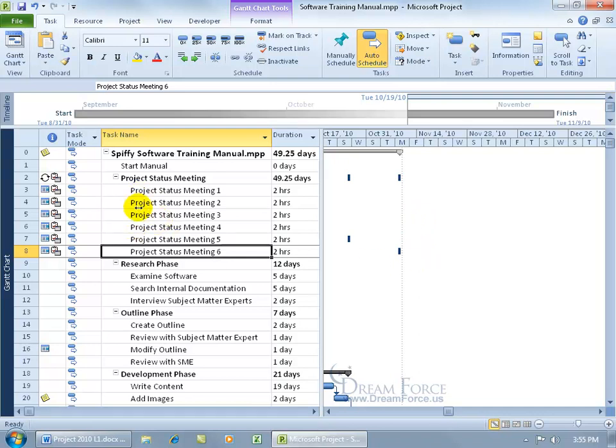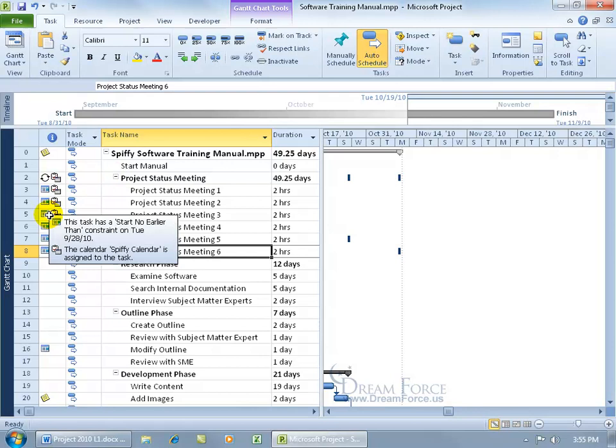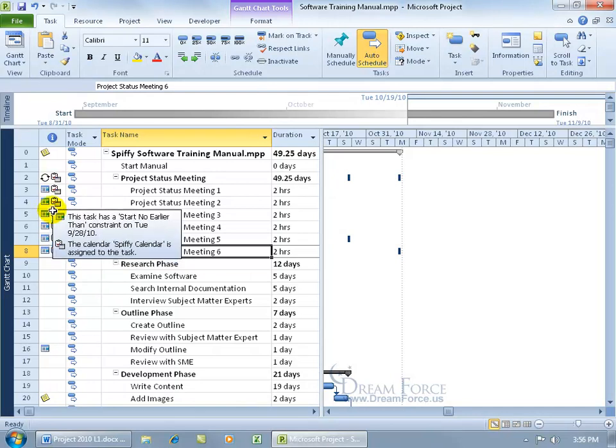And then if you don't want to see all these subtasks to the summary task, like we learned in an earlier training video, you can click on the plus sign to collapse it. But before you do, you can hover over these icons in the indicator column to get more information. This task has a start no earlier than constraint on Tuesday, September the 28th. And the calendar spiffy calendar is assigned to the task.